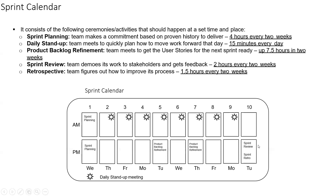The two other events that happen at the last day of the sprint are the sprint retrospective and sprint review. We start with the sprint review, where the team will demo to the product owner and, if present, clients or customers, the work that has been done to get feedback. In this meeting the team will demo the features that have been developed; the product owner will accept or reject them. Based on the guidelines, this meeting should not take more than two hours for a two-week sprint.